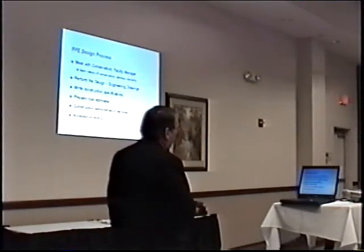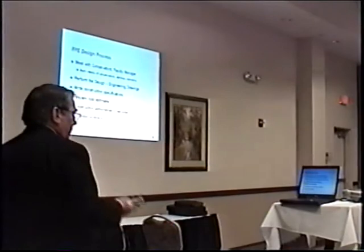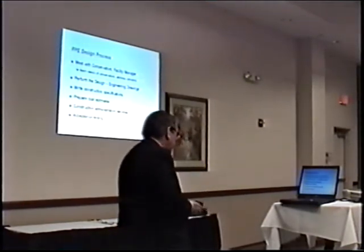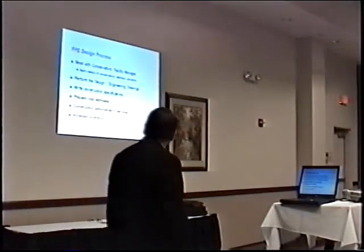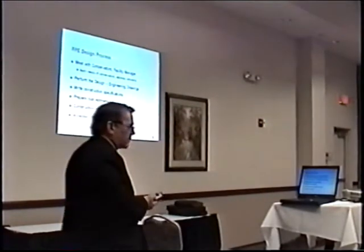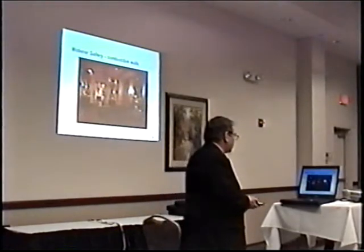But then we get to the point where, well, let's actually design a system. We're going to go ahead with this. The first thing you do is you write your fee proposal. And after you get over that hurdle, then you go to work. So meeting with the conservators and the facility managers to see exactly what their constraints were, so we understood what we're trying to do. We come up with a design to meet those needs, produce the engineering drawings, write specifications, prepare cost estimates. That's hard enough to do when you actually have some experience with the construction phase, but when there's no previous experience, it's a little harder. And then provide construction admin services and acceptance testing.